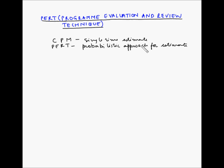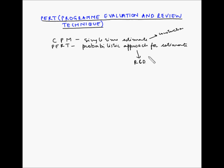In case of construction projects, we can use the CPM technique, while in case of research and development, we can use the PERT technique. CPM is used where project managers can accurately predict how much time a particular activity will take, while PERT is applied in projects where the duration of various activities cannot be predicted with certainty.